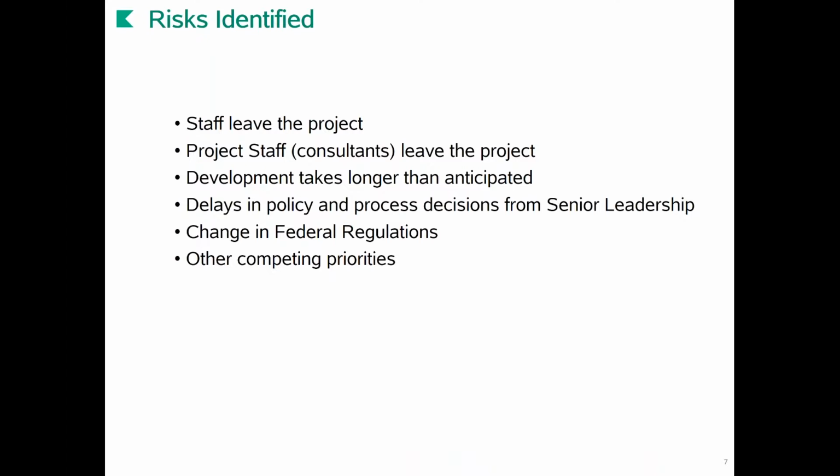I mentioned before, sometimes to get in front of certain people at your campus that can make decisions, you have to get on the calendar 6 weeks out. So delays in policy and process decisions are certainly something to consider. We always have the feds out there that can jump in and cause us a nightmare overnight.